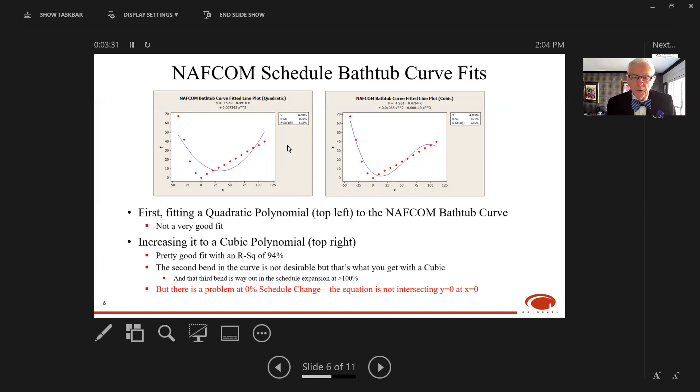I first tried a quadratic polynomial on the top left with X and X squared terms. That's not a very good fit—the R squared of 67 percent isn't great. I increased it to a cubic, added the X cubed term, which gives a fairly good fit with R squared 94 percent. You may notice there's a second inflection point in that curve on the far right side. That's not desirable, but that's what you get with a cubic polynomial. As long as you're not doubling the schedule, the polynomial behaves properly.